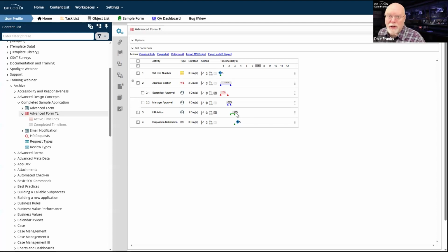I thought it would take a month, but actually people are getting it done in about 3 weeks. So maybe I can cut a week off of this. And instead of saying, well, let's get it done in 30 days, I can say, all right, fine, let's get it done in 21 or 22 days. And that would comport more closely with the actual average that I'm seeing in my timeline analysis.